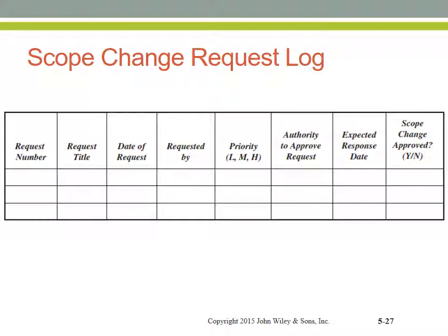That's very, very important because remember, any change request is a modification not just to project scope as stated in the project charter, but it is also a modification of the project budget, and more often than not, a scope change request also will extend your project schedule.